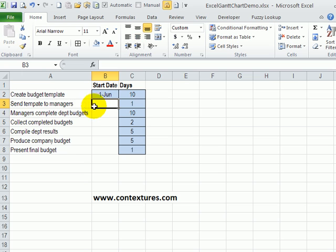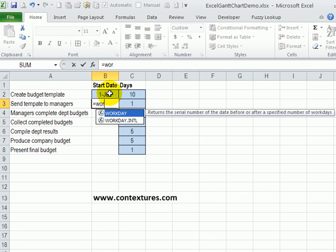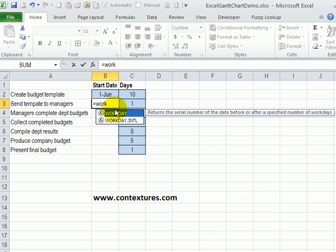So to figure out when this next task can start, I'm going to use the workday function. So I'll type an equal sign, and then workday, and it's going to give us a date based on a starting date, and then the workday that is 10 days after that.